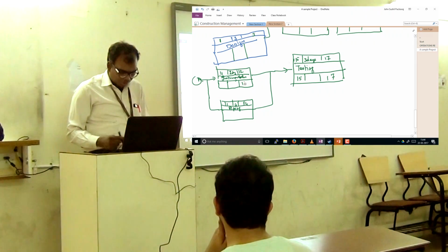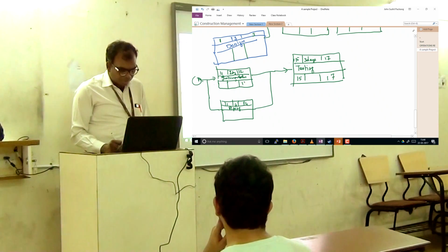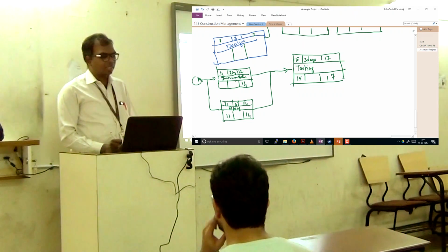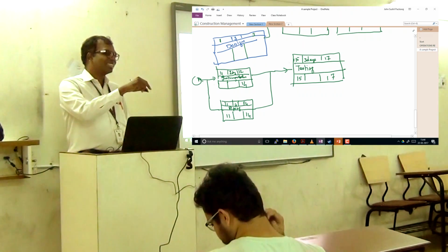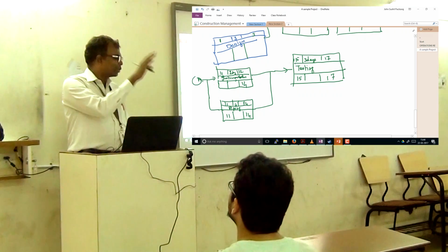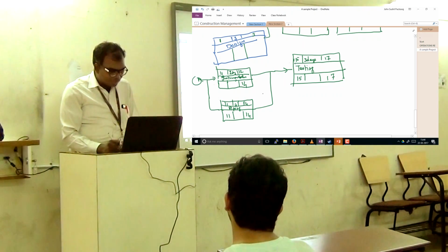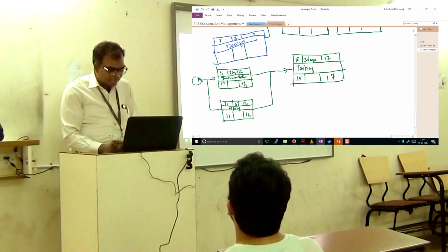So the latest I can do this is 14. Same thing applies here also. 14 minus 4 days, 11. Now here, 14 minus 2 days, 14th day minus 2, 13th day. Okay, so I come here, I get 13.